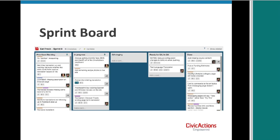Backlog grooming would happen before it enters the sprint, so you have enough information to provide a reasonably realistic estimate. The goal of the product backlog grooming meeting is to make sure you have enough stories or items ready for the next sprint. Many teams have what they call a definition of ready — items need to have certain things resolved before they're given to the team. This can be a meeting every week where the product owner and team look at the top priority items and make sure they're fixed up and ready for the next sprint.